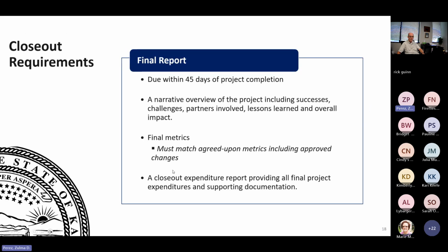The final report. So when all is done and you're ready to close out, we will do a final closeout. And as part of that final closeout, there will be a final report that is due. So we'll be looking at the narrative overview of successes for the cumulative months, the metrics as well, and then of course a closeout expenditure report.